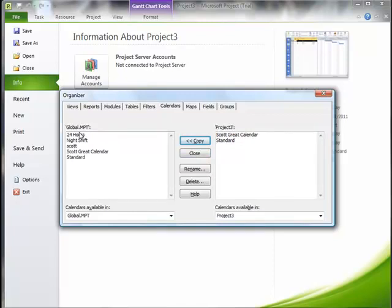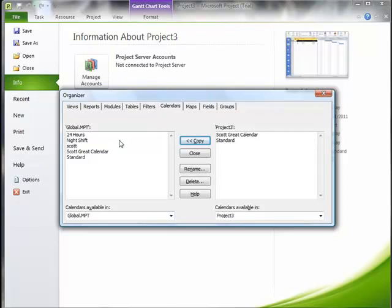...and move that into our global configuration file. And that way this will be available to any subsequent projects that we create on this particular computer. So that's another way that you can do it, is you can keep that file that we created previously here with the calendar information. And we can simply then open that file and move it into the global configuration of any computer that we happen to be on.